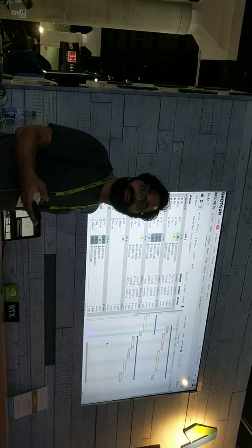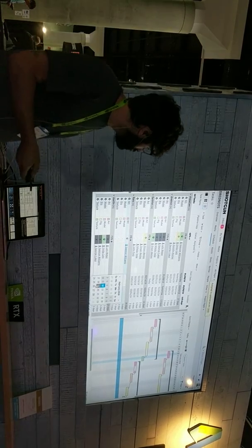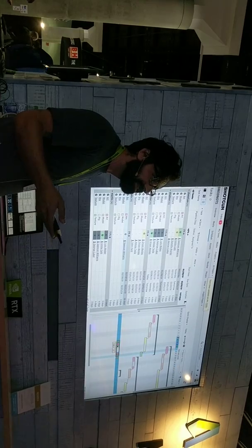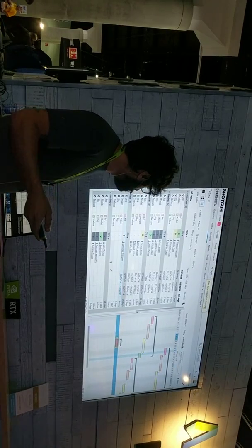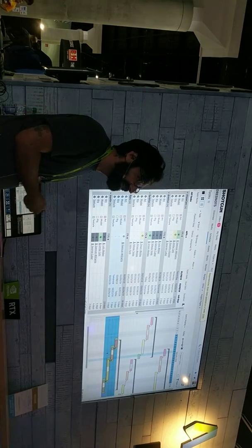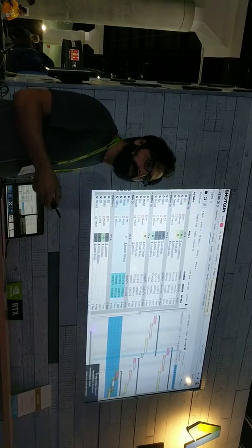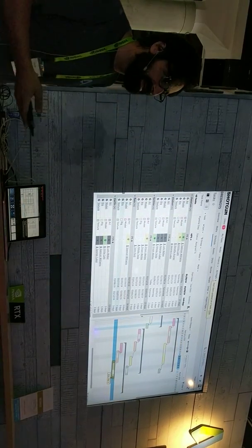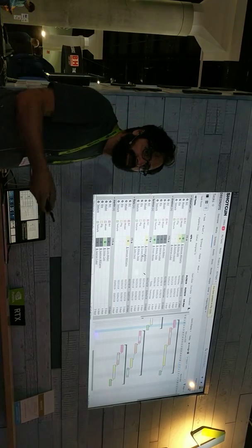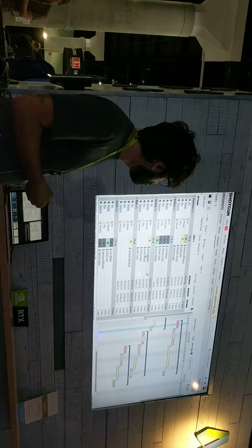Or we can look at a Gantt chart view, see the schedule laid out for you. I can click and drag on a visual review of the schedule. Here I can link up dependencies, quickly schedule all of my tasks. I can make a very quick schedule that lays out exactly how long it's going to take to finish everything.